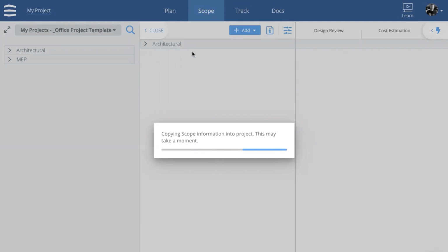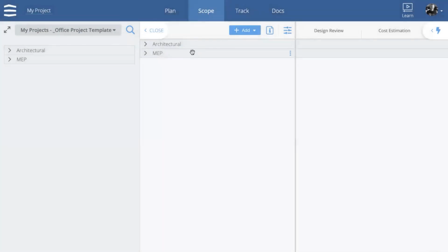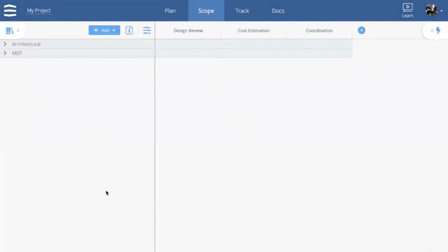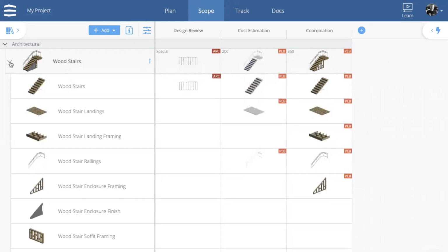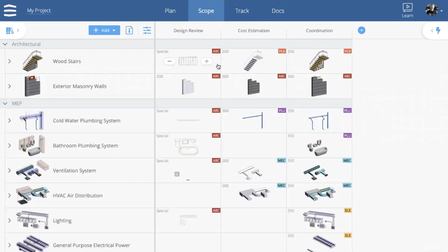And these are folders with the lists of the scope that are required for some of these BIM uses that we have talked about before. So if I click in the bottom to open these up, you can see we've brought in a significant amount of data, not information specifically yet, although everything is information. We can see from the architectural model scope what it is we are modeling, down to the element level. We can see who is assigned to these, and we can really see down to the element level when and who is responsible for what.